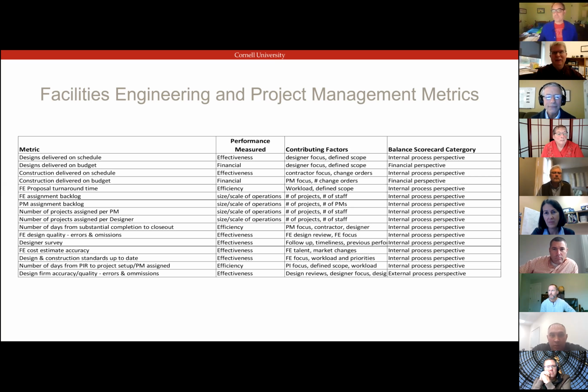Yeah, another indicator might be, like you said, you get a lot of RFIs during the contractor bid process, or addenda, or wildly fluctuating bids on the set of drawings because they're too confusing. They're missing key points. Yeah.